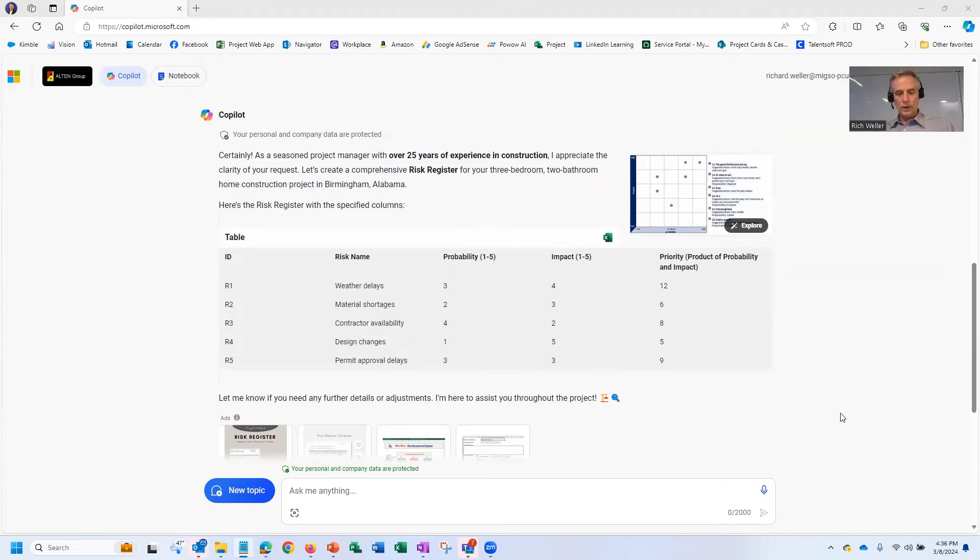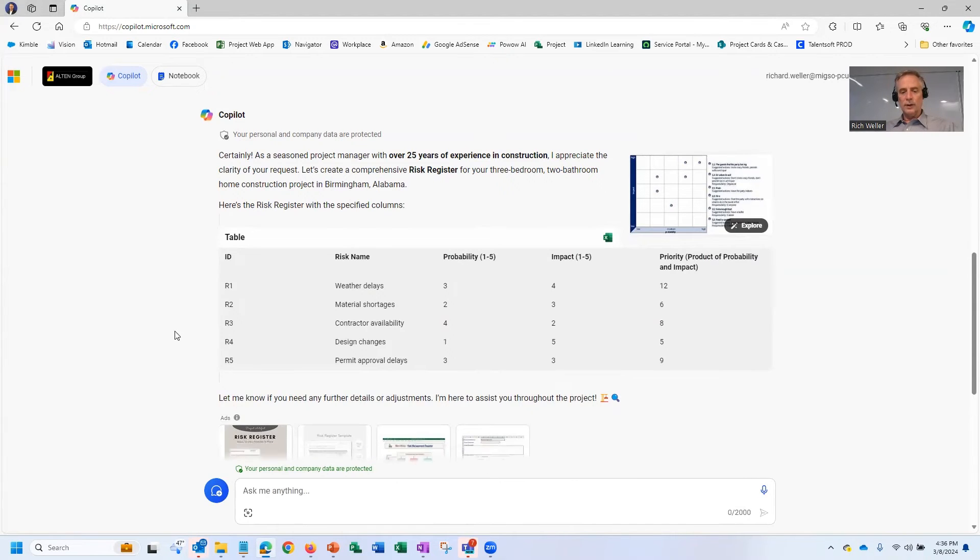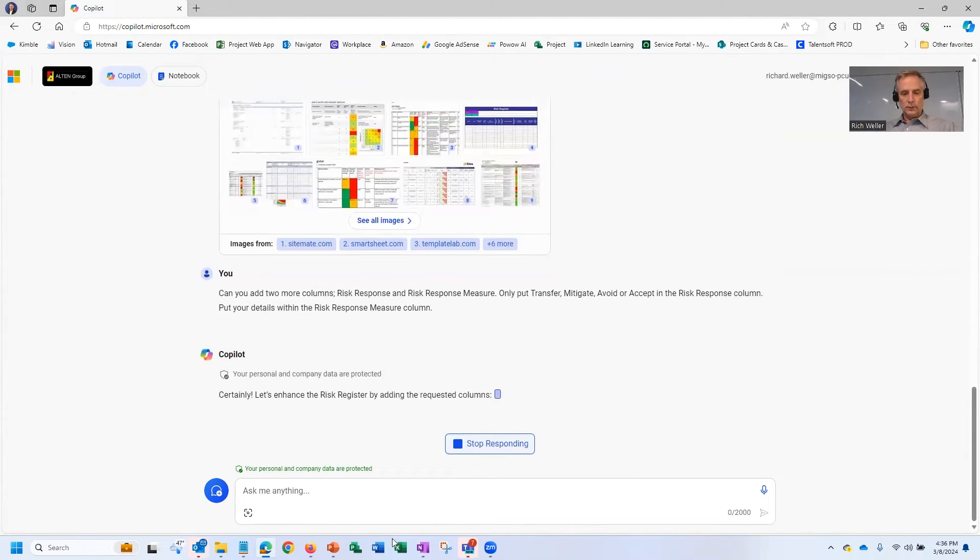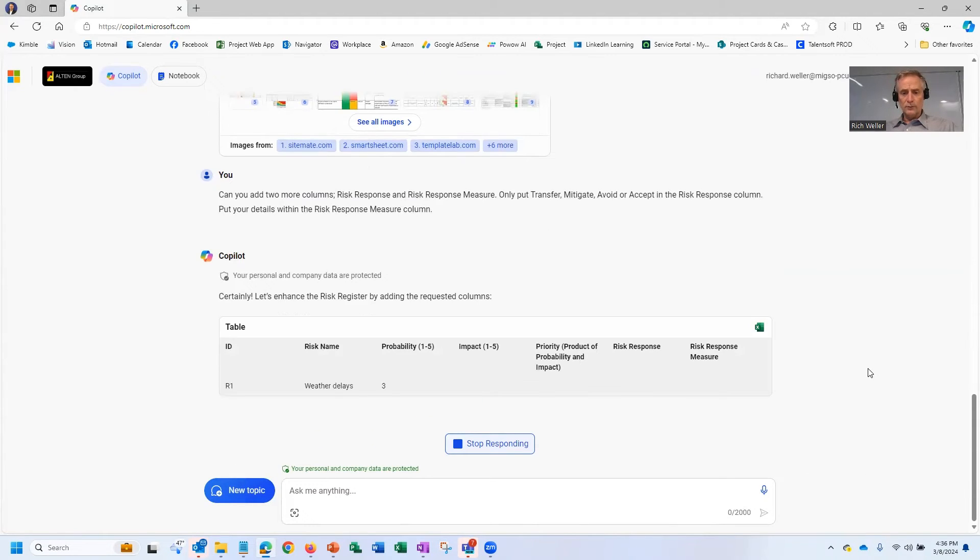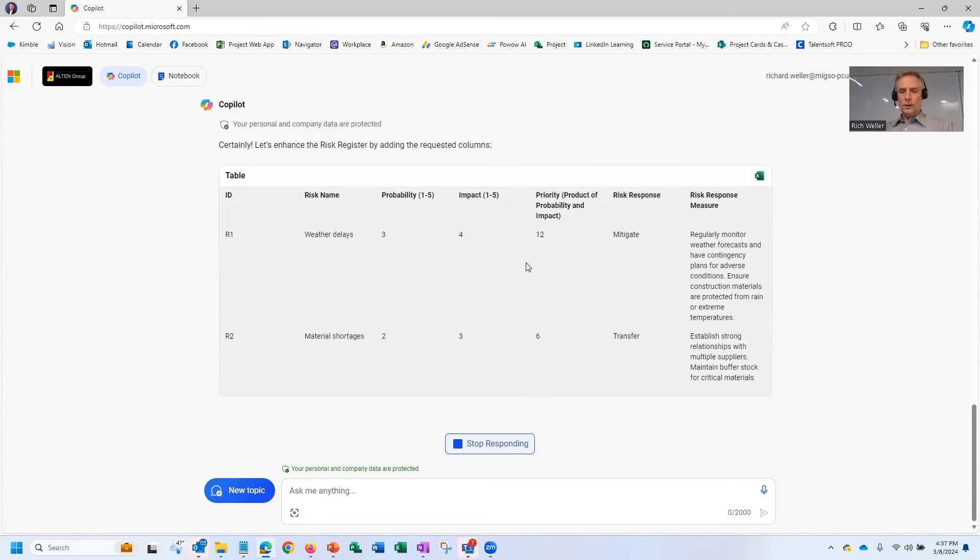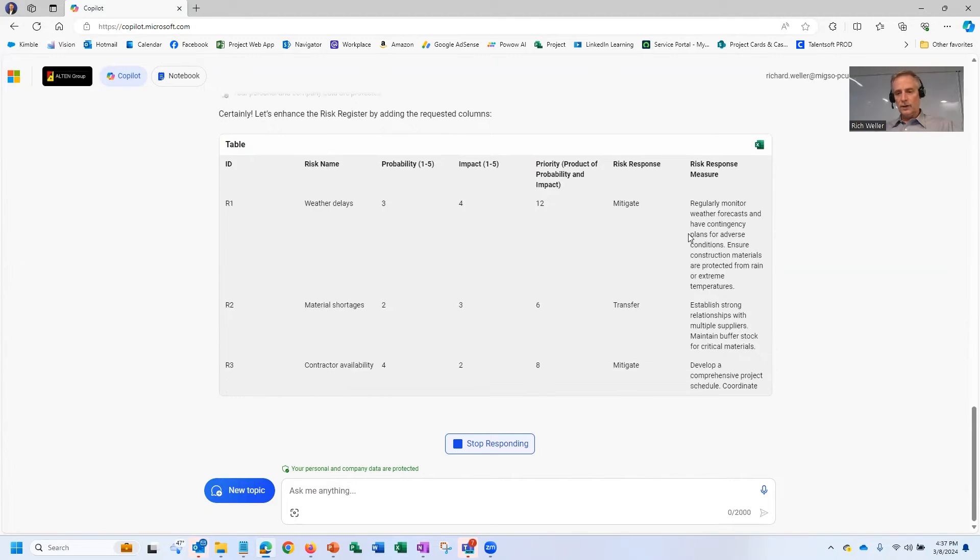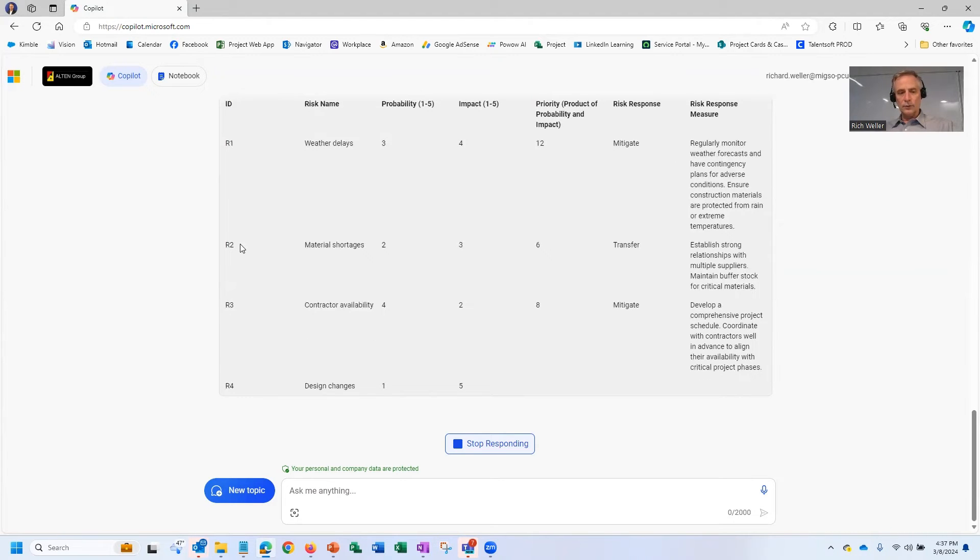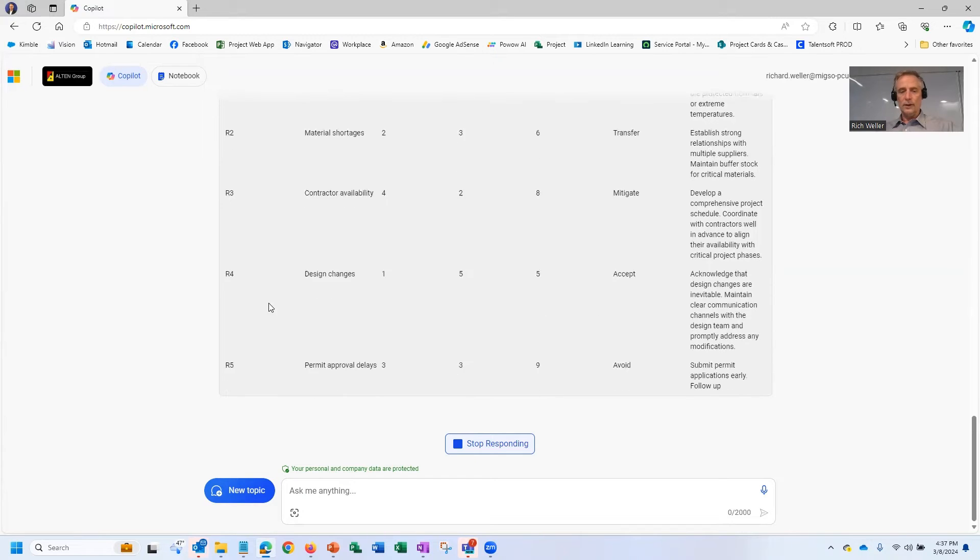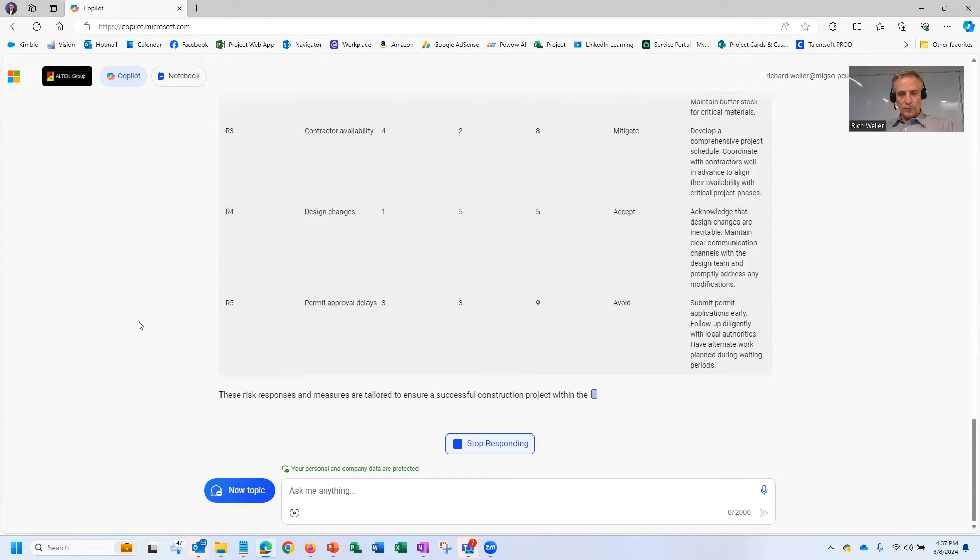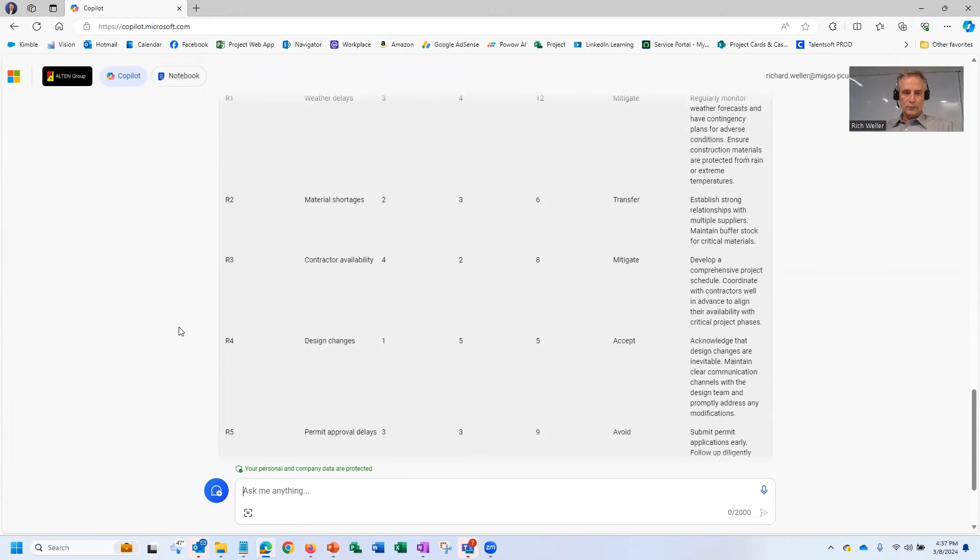Can you give us two more columns? Can you add two more columns to that risk register? Can you add the risk response and risk response measure to that table? So let's see what Copilot comes back with. Feels like the same first few columns that we asked for. So it's regenerating that. And now it's telling us, hey, for this risk, you should mitigate this. And here's how you go about mitigating it. For this next risk number two, you should transfer that. Here's how you should go about doing that. And so you can see it's produced five different risks here.